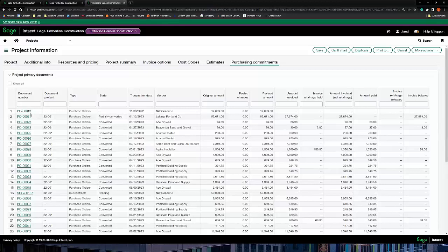So in here, I could see all of the projects. I could also see any subcontracts that we have on the project, the stages of those subcontracts under pending, which means nothing has been processed, no invoices or anything has been created towards that. But have any change orders affected that initial contract, and by what amount? So again, able to get a breakout of key information from here.